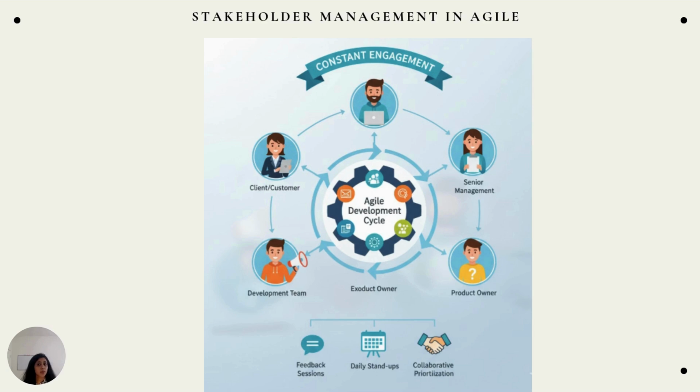Okay, the agile approach replaces the traditional detailed project charter with the agile team charter. This document is designed to be broad and high level, and the whole team approves it. So in predictive also, we do have a team charter if your organization is following. You might already know it's detailed documentation: who'll do what, who's responsible for what, the roles and responsibilities, and it's a detailed project team charter.